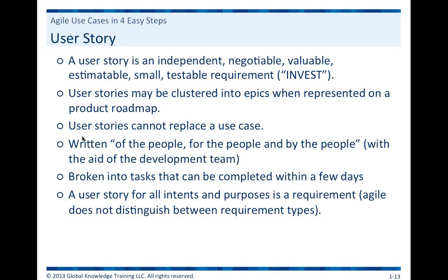It's just another tool. So when we talk about user stories, we have to have three very distinct components of a user story. And that is who the person is, so I, as for example, client service agent, what they need and why they need it. And those are the three basic components of a user story.